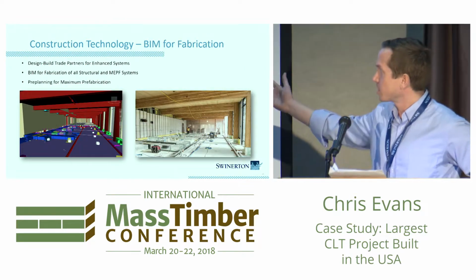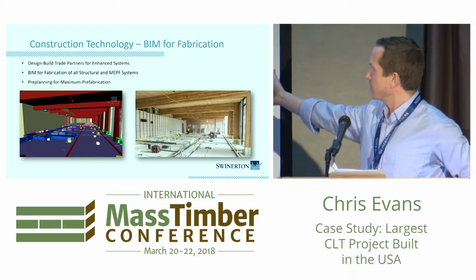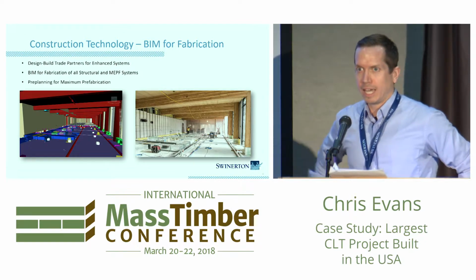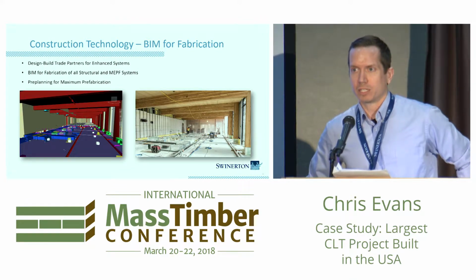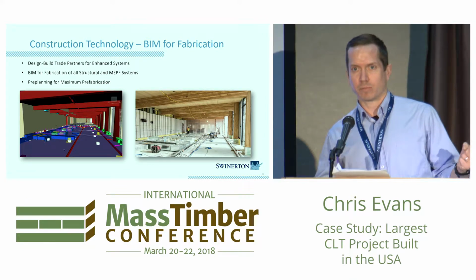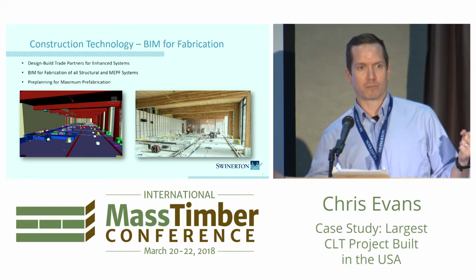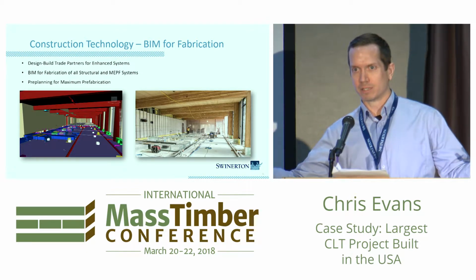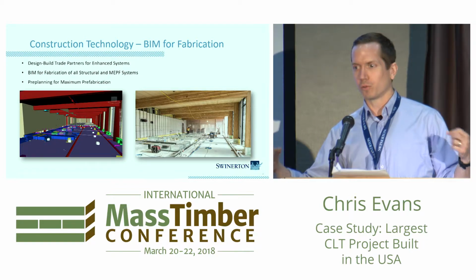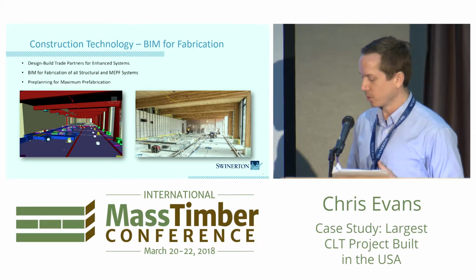So here's a good picture of the BIM model and of the actual construction. And what you'll see is we're saying at the top BIM for fabrication. Most of the processes I've been involved with before have been using BIM for clash detection and for coordination. And we said the mass timber is going to be built with a model so that we can fabricate from it. Let's do the same thing with everything else in that building.